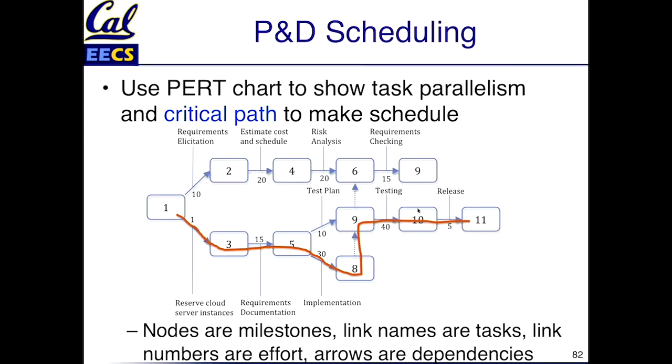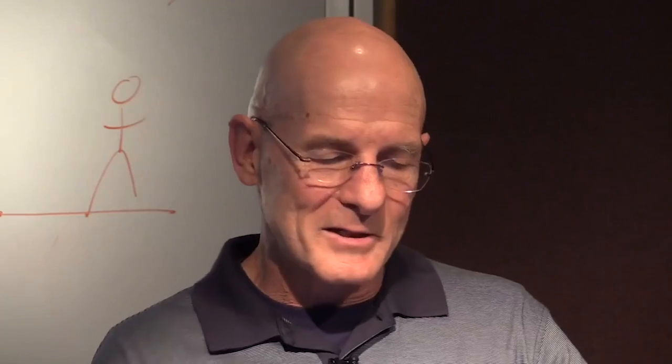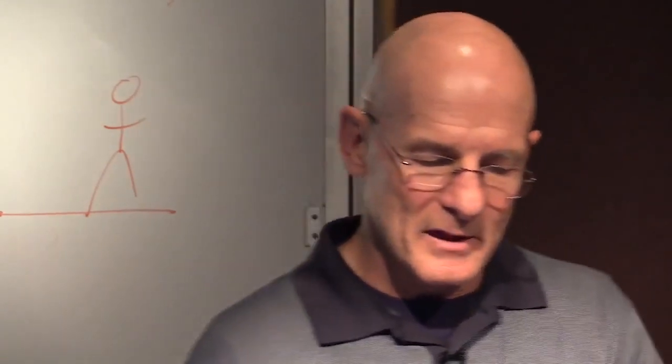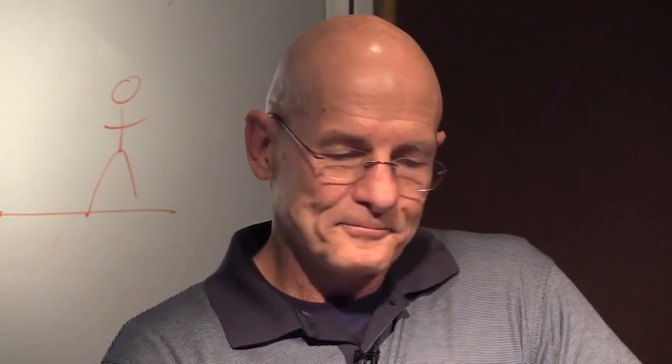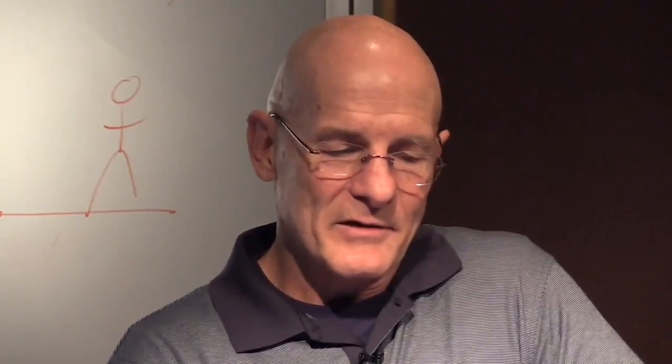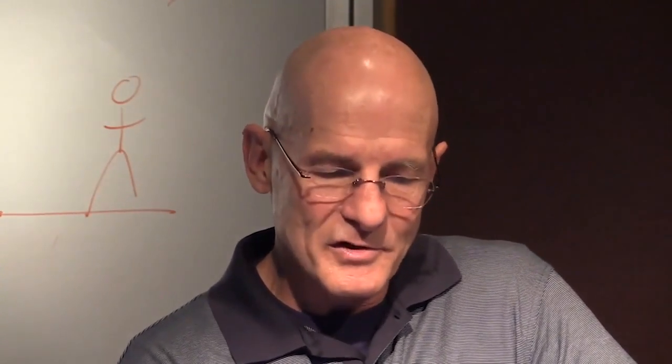So if you're the project manager, you did the SRS, you break it into tasks, you get it into costs, and then you use those to create the schedule using something like PERT charts. Now that you've made a PERT chart, what do you do while the project's going? Well, now you want to compare what you predicted to how long things are taking, and so you track both the actual expenditures and the time for those tasks, maybe against your PERT chart.